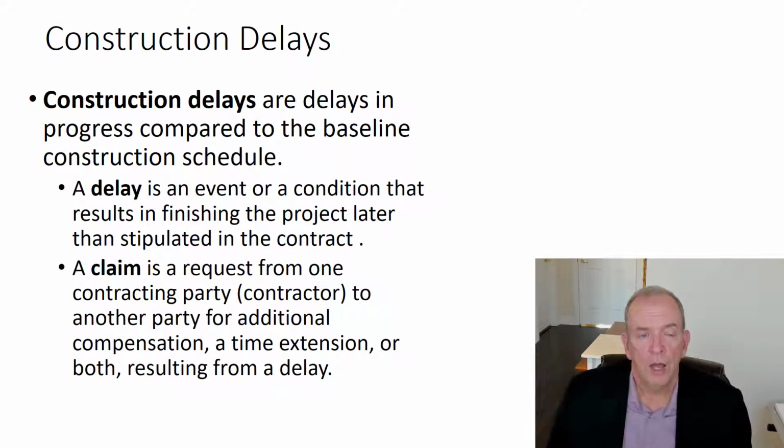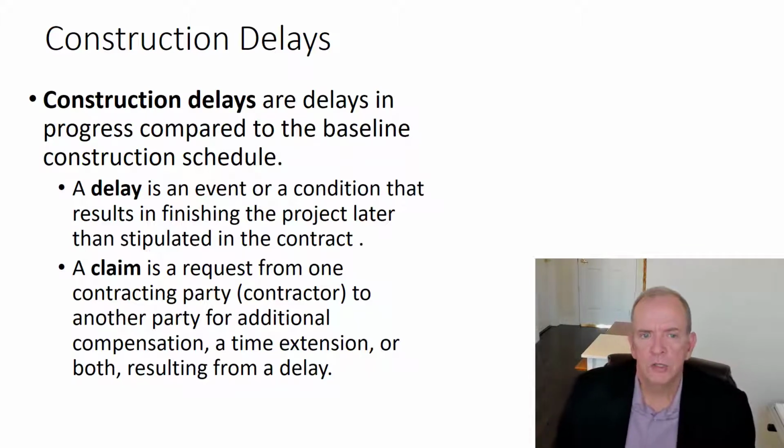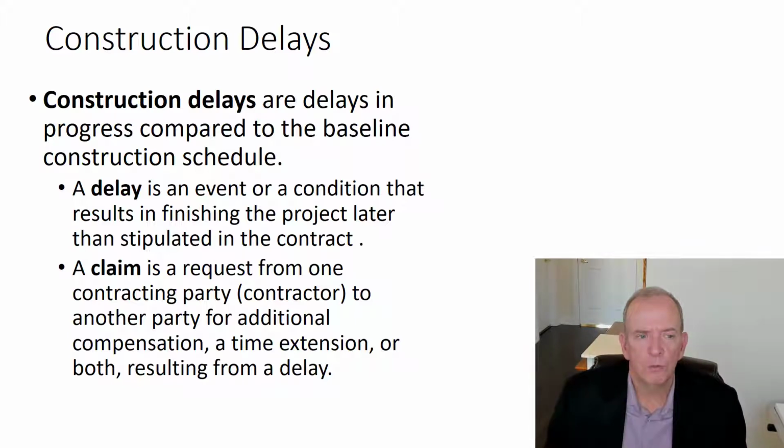And another topic here that we'll touch on because it relates to lecture 6A is delays. In 6A we talked about changes, quality control issues and rework, and these things all potentially lead to construction delays. A delay can be defined in many different ways, and often the contract may not even be that clear, but generally it's accepted that a delay is a delay to the critical path. So that means it's delaying the project.